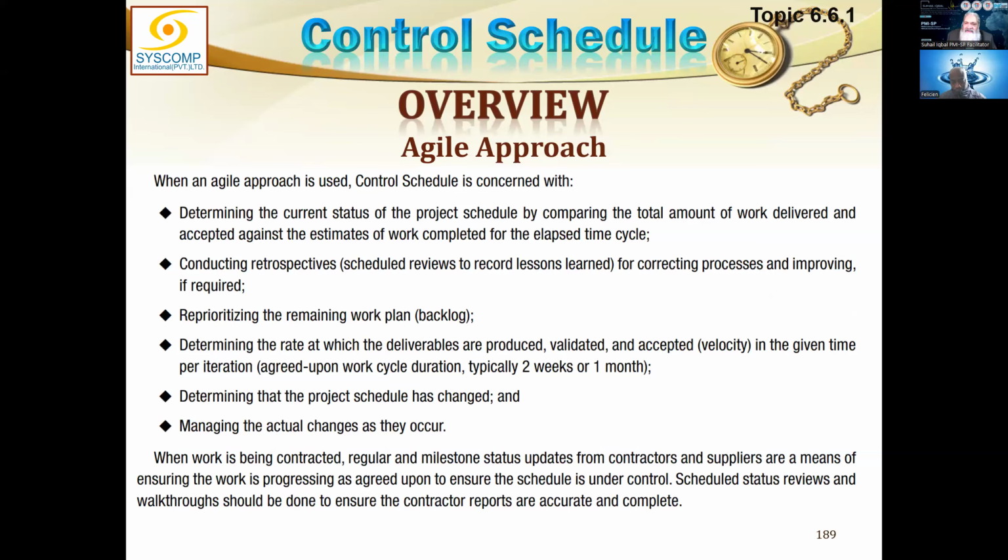So during one iteration, whatever we were working on, we deliver that, get back, and see what all the requirements are, the new and old requirements, and what the highest priority items are. We reprioritize that work and pick the most important work from the customer's point of view. So we deliver the highest value by selecting the highest priority items, and we keep delivering after every 2 weeks. It's a continuous process. After we come back, we reprioritize whatever is lying in the backlog. Backlog means where the requirements are lying, and that backlog is sorted, reprioritized, and then we pick up the highest priority item and start working on it.